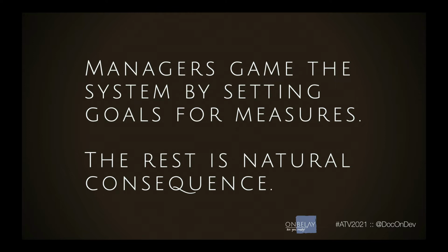Same thing. If you do a reward for code coverage, I can guarantee you're going to get an increase in code coverage, but it does not mean that you're going to get better test quality. Right? In fact, you'll probably get decreased test quality overall. And a reward for higher velocity, it's going to lead to more brittle code, lower test coverage, more bugs, all kinds of side effects. All right, so a little bit of a digression there maybe, but we talked about what